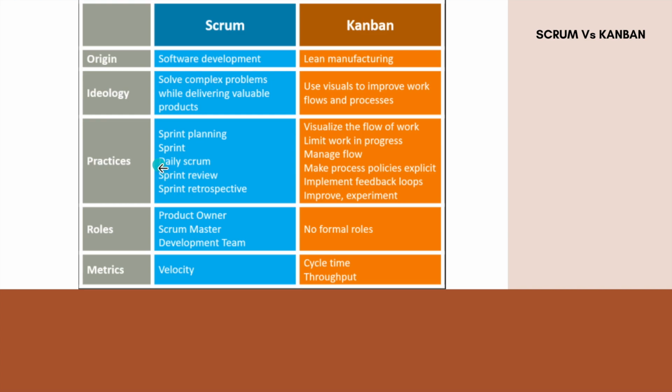And then there is a daily Scrum. So daily Scrum is just like a stand-up meeting, which is held between different teams, where each team member updates what he'll be doing today, what he has done yesterday, and what the progress is or any issues he is facing, and those things can also be discussed there, any blockers and all. So the Scrum Master will note down all those things, and he's actually running the sprint planning, and he will try to clear all the blockers and collaborate with whatever is needed for the particular team or person to help more and more to fix all the tasks or move ahead with the ticket.